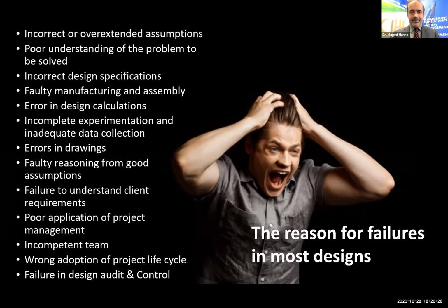Incompetent team. Again, one of the factors causing a lot of rework is the team working behind the design as well. The team is collecting the requirements from the client. If their expertise and knowledge is not competent to collect the requirements correctly from the client, you will find yourself in a design phase that should be finished in 1 month taking around 1 year.